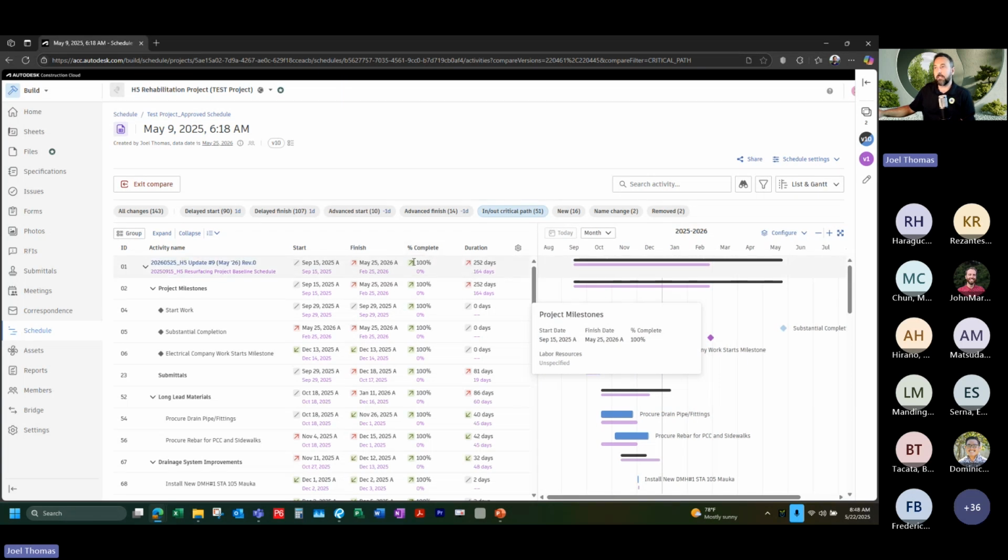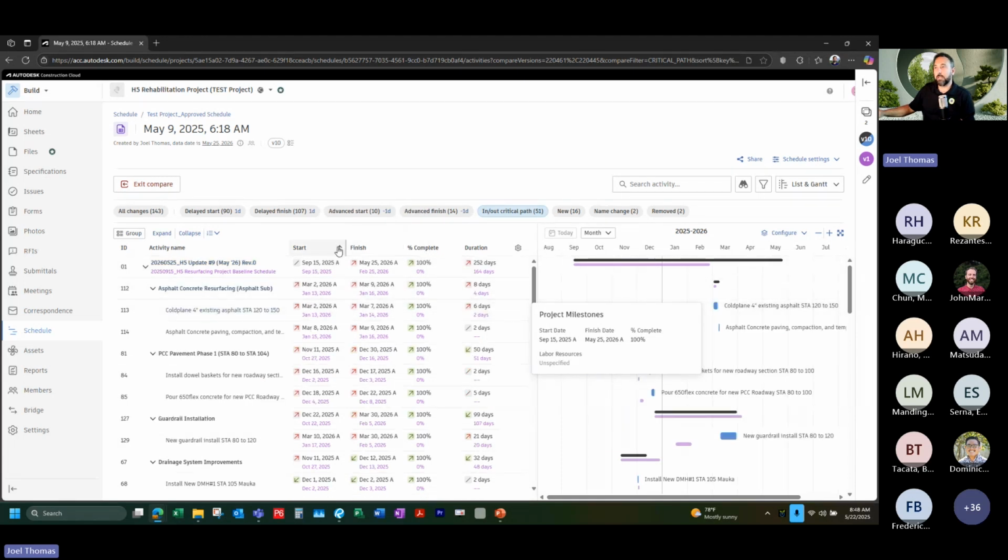Looking through this, anytime you see these little arrows, it's telling you this date pushed beyond what this showed. Black lettering here is the as-built schedule, so the final, and then the pink is the first schedule. Looking through this, you'll see all these carets, and these are kind of more like the bigger buckets of activities. I'm kind of just trying to find these actual activities and to see where there were differences. And I would make note of all of these delays where we had some shifts.